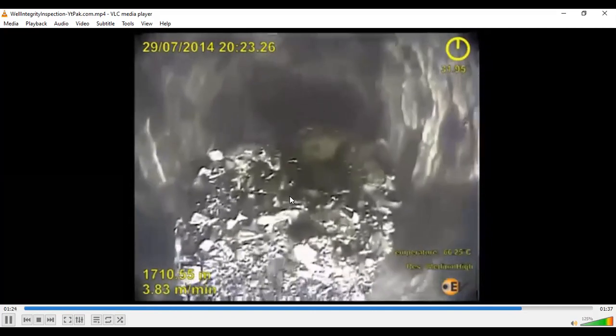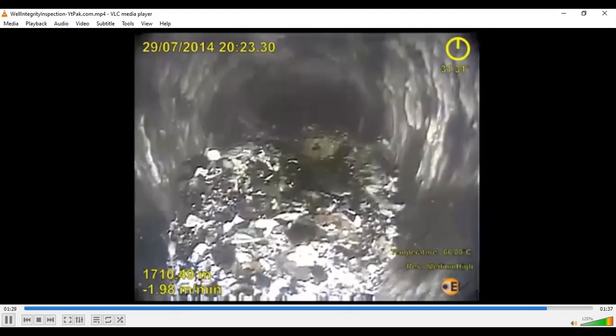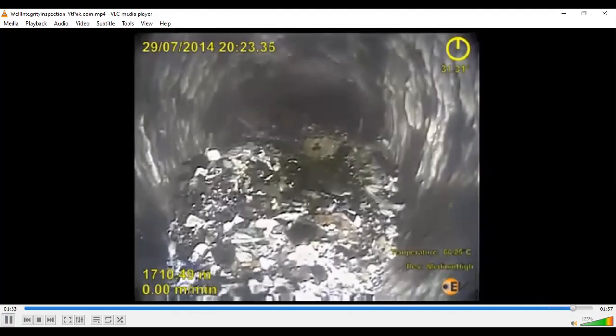As a direct result of Optis HD E-line video diagnosis, a scale cleanup operation was included in the workover program. Fortunately, so they have to clean up this one, otherwise their well will not flow. For the operator, a casing rupture was never the problem.